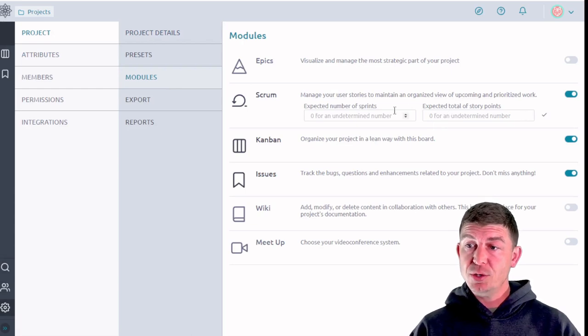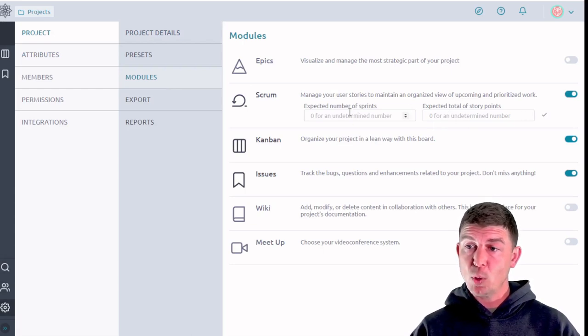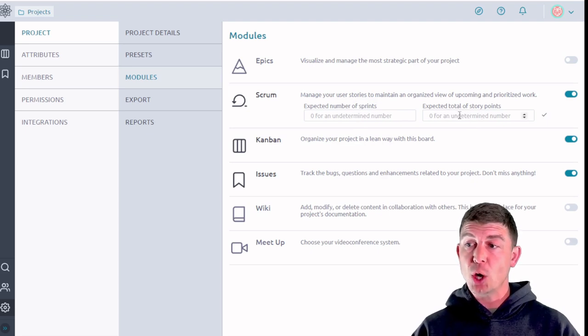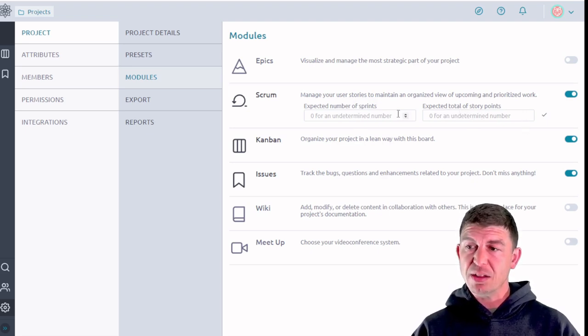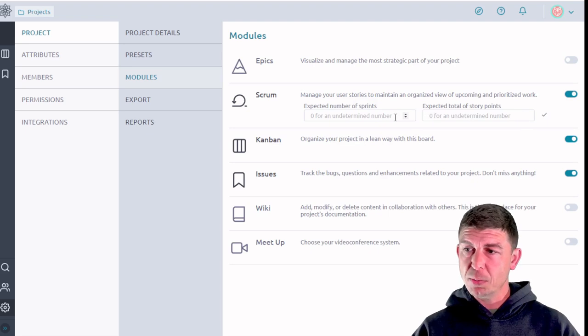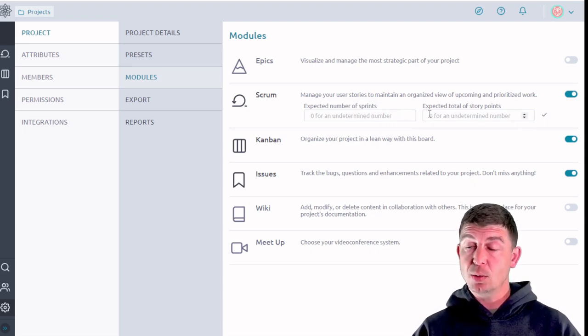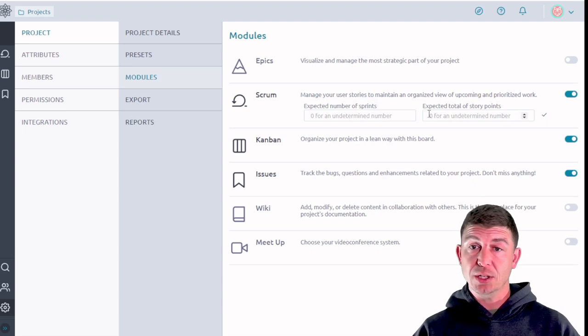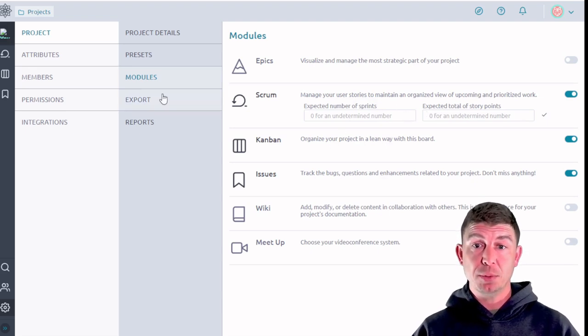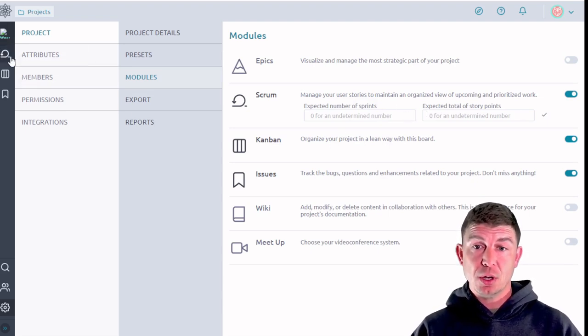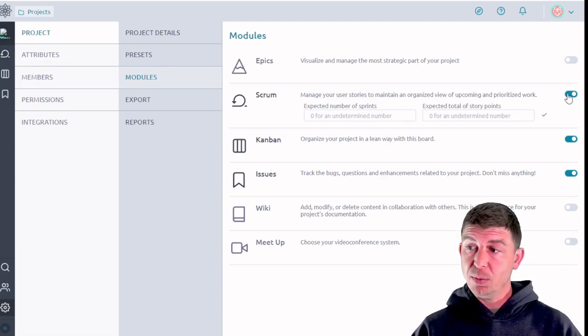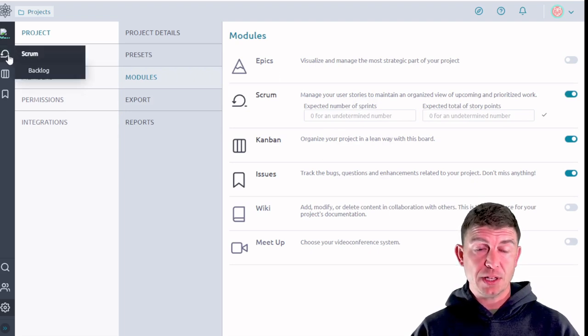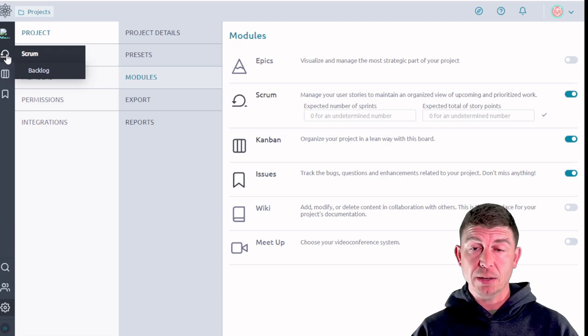Now as you can see there's two fields here. One is for expected number of sprints and the other one is expected total of story points. I'll explain these a little bit more in just a second but I wanted to show that if you leave these blank it's going to result in a burndown chart that doesn't populate. So after we flip on the switch here you'll notice that the scrum button has popped up here over on the left hand side.